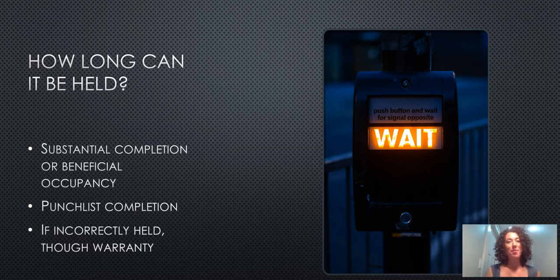However, if we're going to talk about completion, most of the time it is 100% complete before we see any movement in retention. This doesn't say that you can't negotiate it. I'm just using some basic examples so that you can follow through. However, if it is not spelled out and if it is not pursued, there are times that that retention will be held all the way through the warranty period.